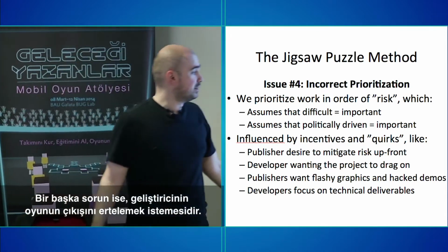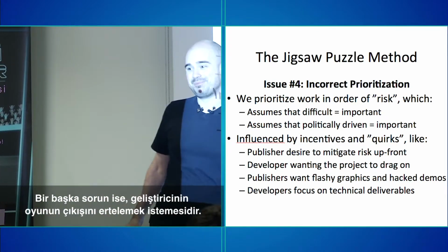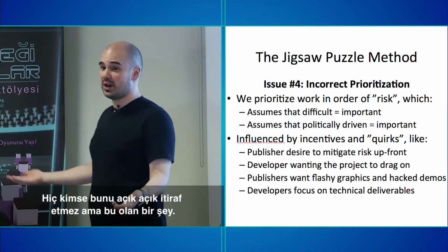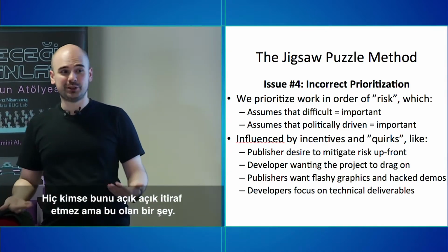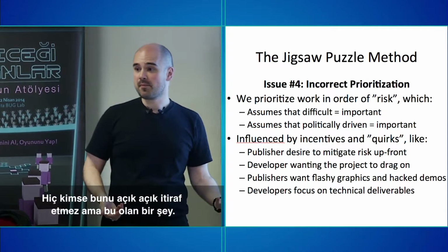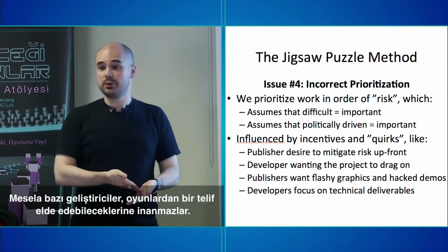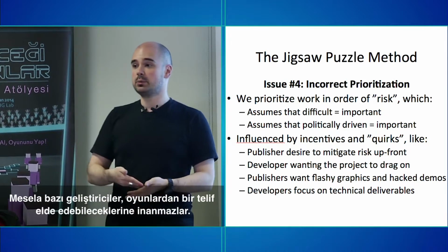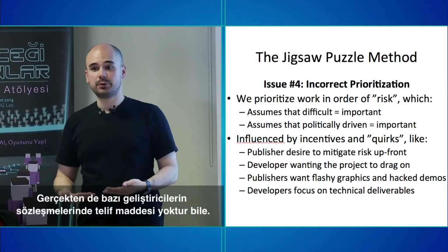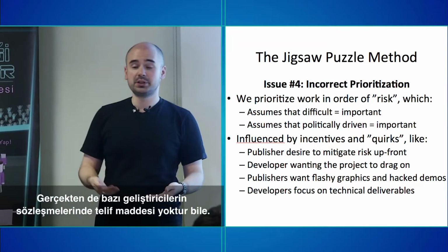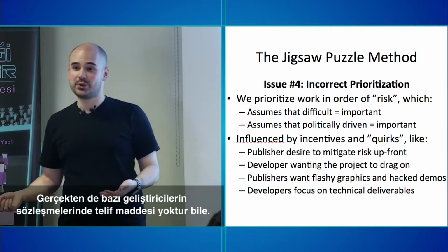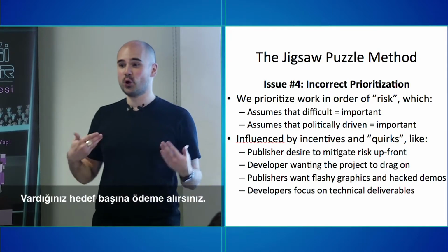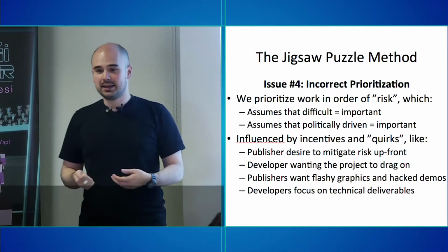Now another problem is that the developer wants the project to drag on. Now no one actually ever admits to this, but it does happen. For instance, some developers don't actually believe that they will ever see any royalties from the project. Indeed, some developers don't even have royalty clauses in their contracts. There are no royalties. You only work for milestone payments.